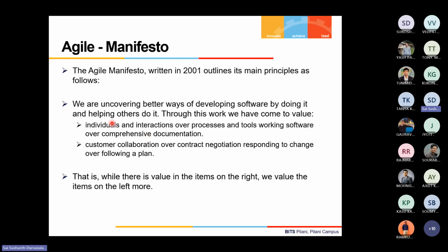Whereas what Agile says is, in order to cut short the software development lifecycle and to make it short and iterative enough, let's give more focus to the individual and the interaction among the individuals, more priority over the extensive documentation, right? So that is where decisions, maybe the design change or whatever, are taken more frequently in the daily meetings. These are called daily stand-ups and other things.